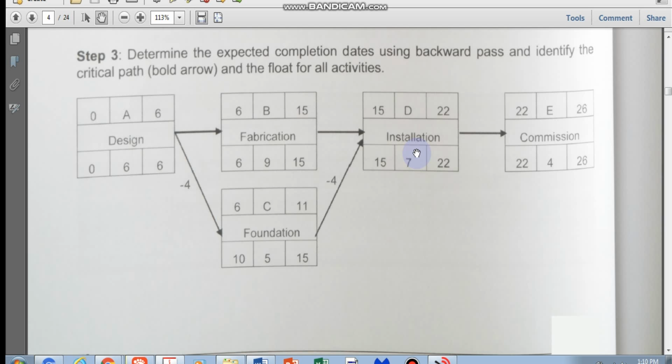So in the event of that happening, you can have fewer resources in your study. Okay, so here you can put 4. There are 4 days here for foundation, meaning that I can take away my 4 guys. I can take away 3 or 4 persons from my foundation work and borrow them to another activity, for example, in another project.